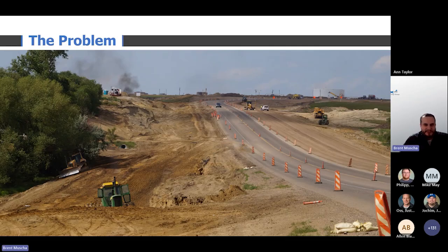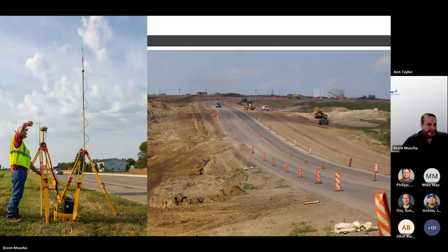Well, maybe you have a surveyor on the project, and the surveyor could come give you a station offset of where that test was, but maybe right now he's at the other end of the job getting set up, and it's going to be later in the day when he finishes up some other stuff that he'll be able to get over there. And by then, the contractor's going to have another lift on and won't be able to tell you where that test was taken.